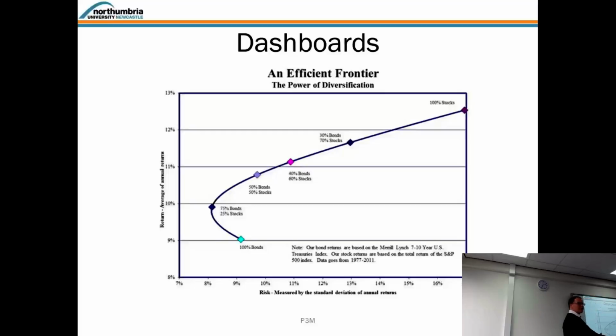So you literally have a look at the history of your projects. Look at what was initially budgeted or what the client paid versus your actual output, what came out on the final costing sheet, and whether there were claims made afterwards. Did something not work? Then you come to the ratio. So maybe you spent something like 90% of the fee that they paid. This is amazing.